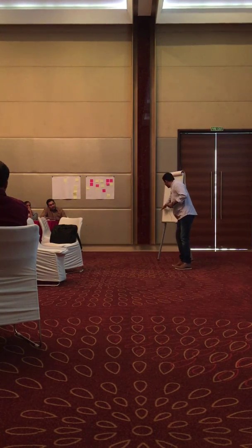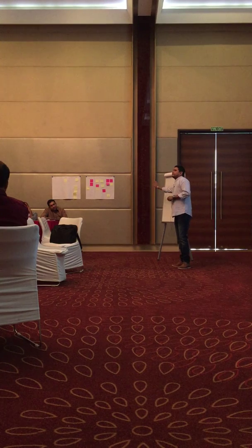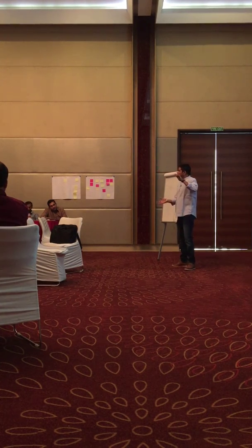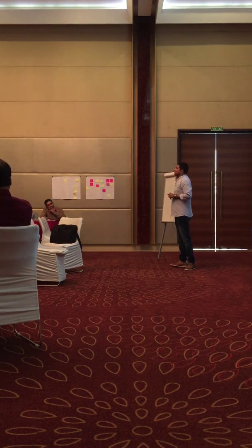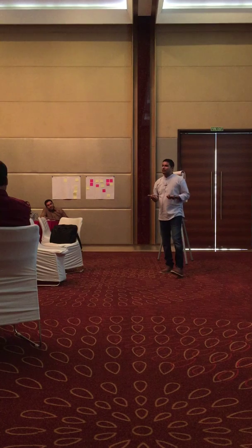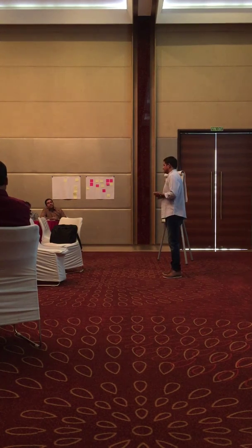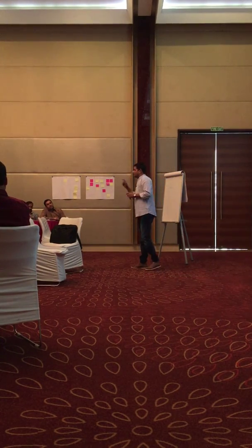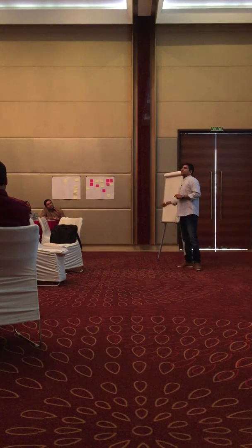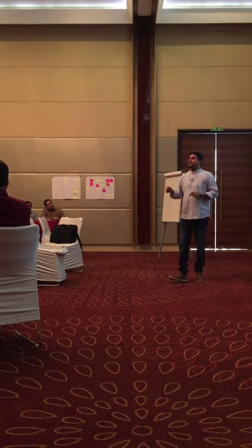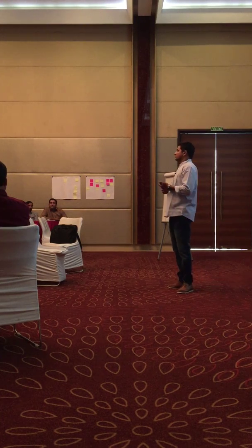Suppose I have defined so many criteria, but I say, okay, regression we don't do it, we'll do it before going to release, stress testing we don't do it, we'll do it later, automation we don't do it. So much stuff you are keeping aside and planning to do just before going to release. That might impact your release because the time may not be sufficient, right? So you have to decide what needs to be done to make a potentially shippable product increment, and that should be part of your definition of done, and you must try to achieve that as a self-organized cross-functional team.